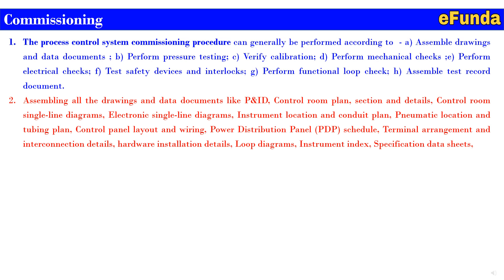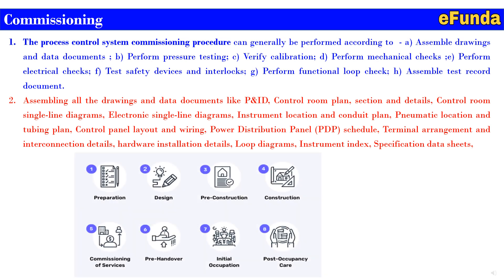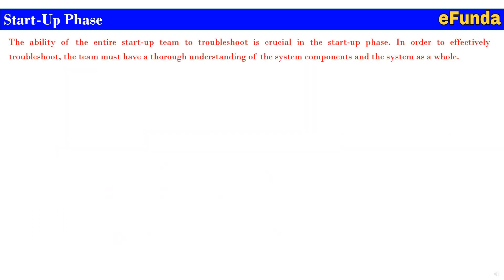Assembling all drawings and data documents includes: P&ID, control room plan, section and details, control room single line diagram, electronic single line diagram, instrument location and conduit plan, pneumatic location and tubing plan, control panel layout and wiring, power distribution panel (PDP) schedule, terminal arrangement and interconnection details, hardware installation details, loop diagrams, instrument index, and specification data sheets. One can refer to the figure showing preparation, design, pre-construction, construction, commissioning of services, pre-handover, initial occupation, and post-occupancy care as steps followed during commissioning.